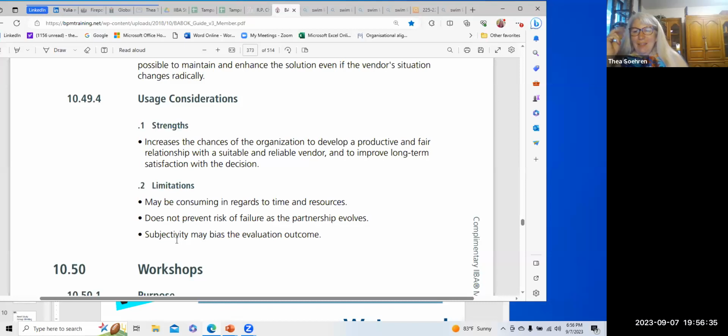True. There are two things I want to be sure you're aware of. We were talking about whether the company can do the job if they have a problem. One of the problems I have seen is a rock star developer who left halfway through the project, and nobody else could do the job because the rock star developer had created such complex code that they were the only one who could do anything with it. That's not what you want.